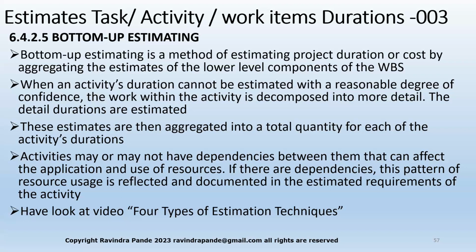So bottom-up estimating is a method of estimating duration or cost by aggregating the estimate of the lower level components of WBS. So WBS is really important, and we are using WBS for the last many decades, and that's why we are good at WBS. We are good at disintegrating the task into a smaller number of hours. When an activity duration cannot be estimated with a reasonable degree of confidence, the work within the activity is decomposed into more detailed task activities and the detailed durations are estimated.